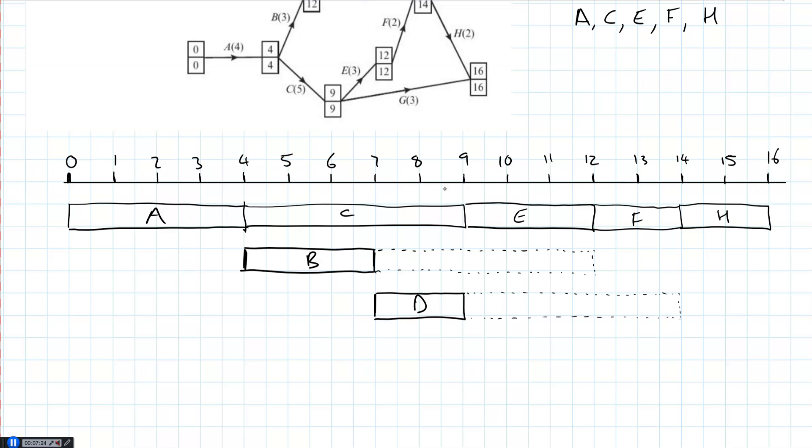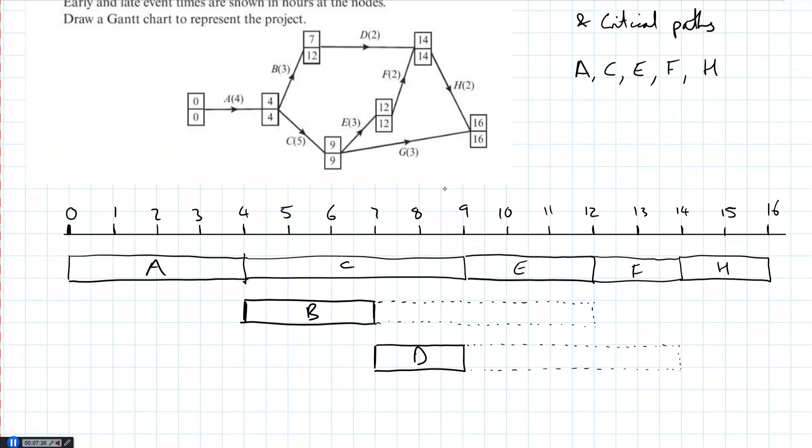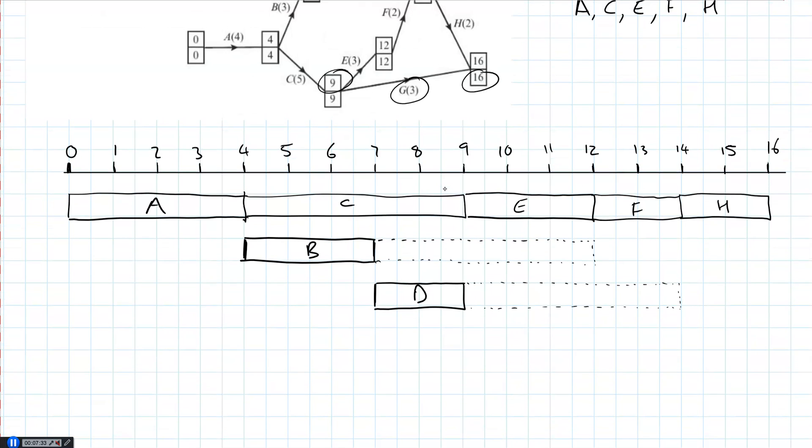Let's get this done. So now we need G, and that's the last one we need. So G can start at 9. Takes 3. And finishes as late as 16. So G starts at 9. Takes 3. 1, 2, 3. So it goes up to 12. And it can finish all the way to the end.